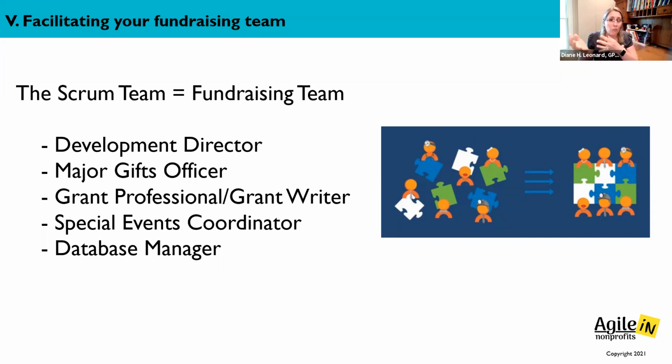But regardless of the criteria being used, the team should understand this is the number one priority for our team. This is the number two priority using those criteria. This is the number three. When I talk about sequentially ordering, that is why I'm emphasizing that the team should not have to debate: is this tied for second? This is tied for third. Where does this fit? Leadership for the organization should be giving enough information that we are clear what criteria were used for priorities and what they are. That way we can work our way through them.